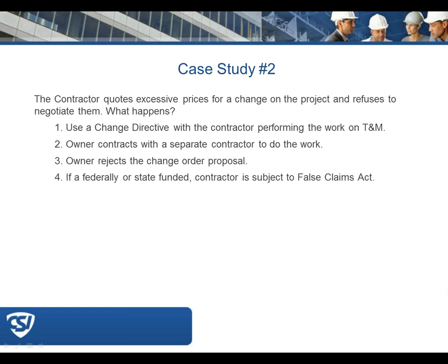Matthew, anything from our attendees? Yeah, we have just a little bit here. Michael wanted to state that time and material is not the only way to proceed with the CCD, and you may continue to negotiate or use unit prices. That was a little bit of a comment from Michael's side.